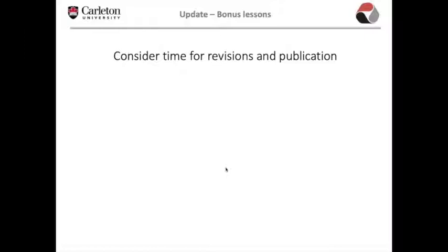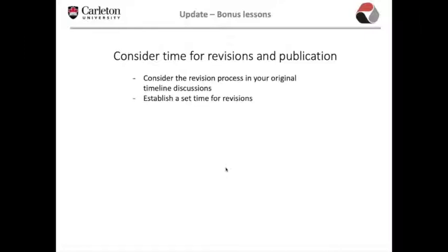And to add to that, if there are any major issues brought up, for example, in decisions regarding analysis or interpretation of data, it can create a lengthy discussion and even disagreements within the team that will need to be resolved. It is firstly important to consider this process when outlining your timeline from the beginning. For example, does submission to a journal happen before or after contract close? Because at that point you will be at the mercy of others at that stage.